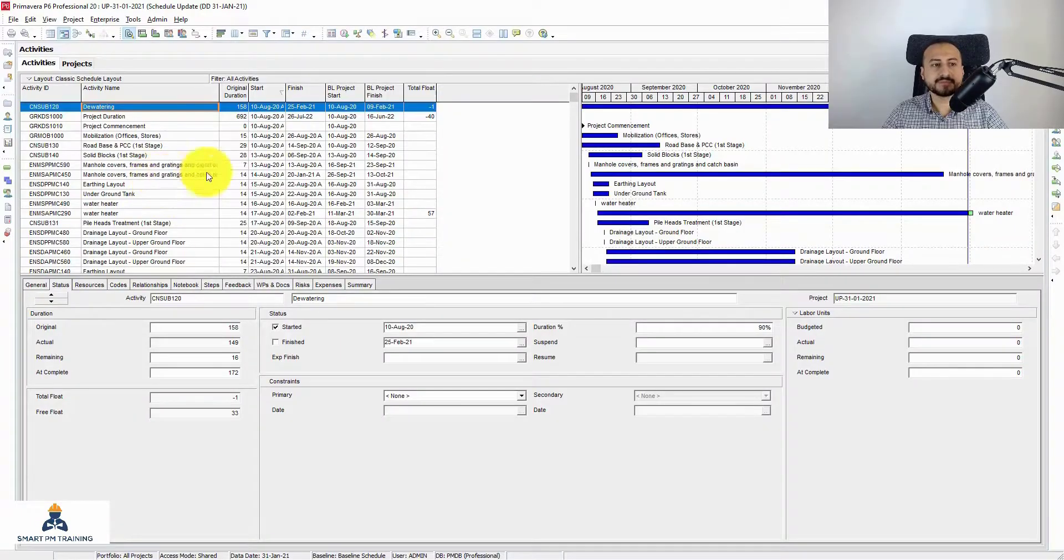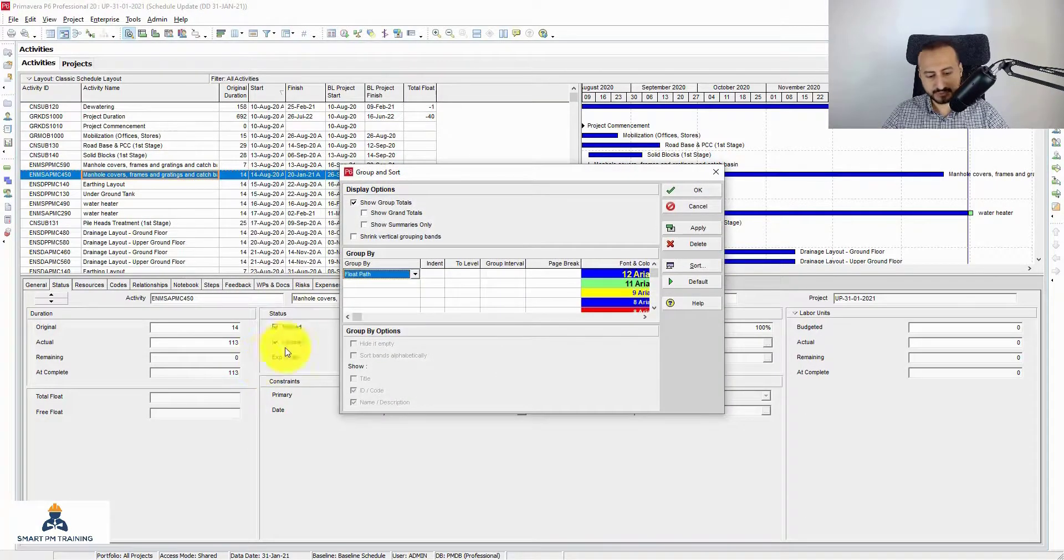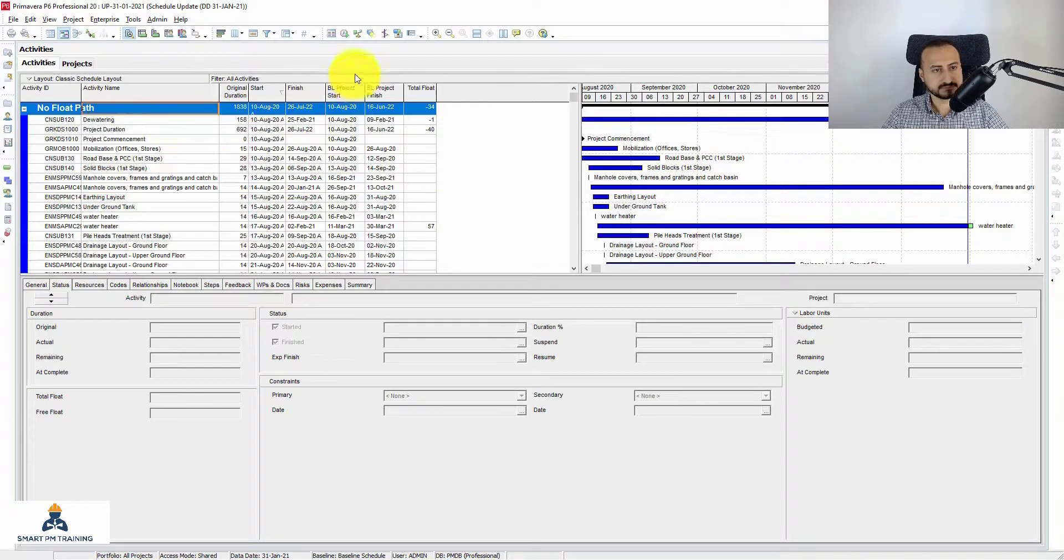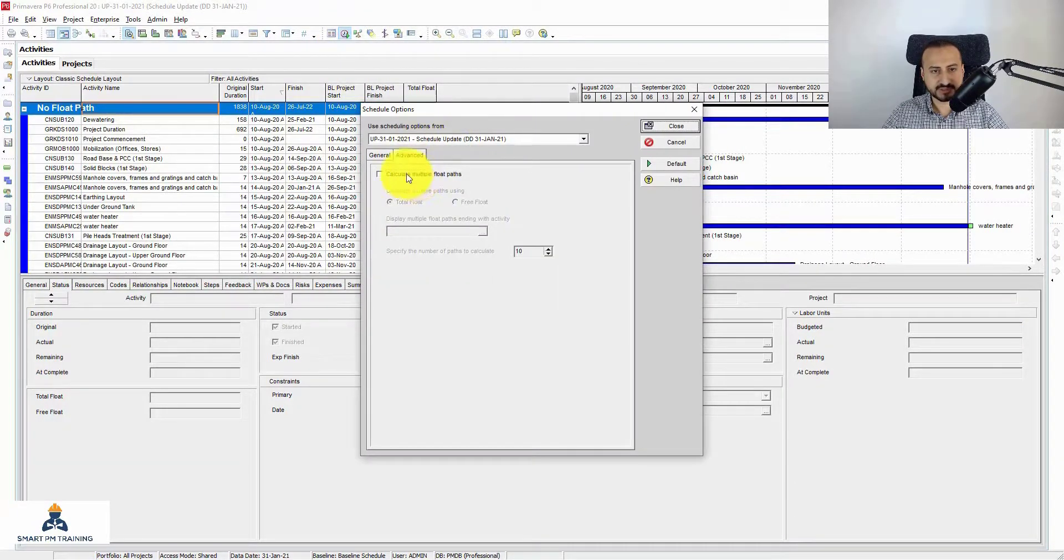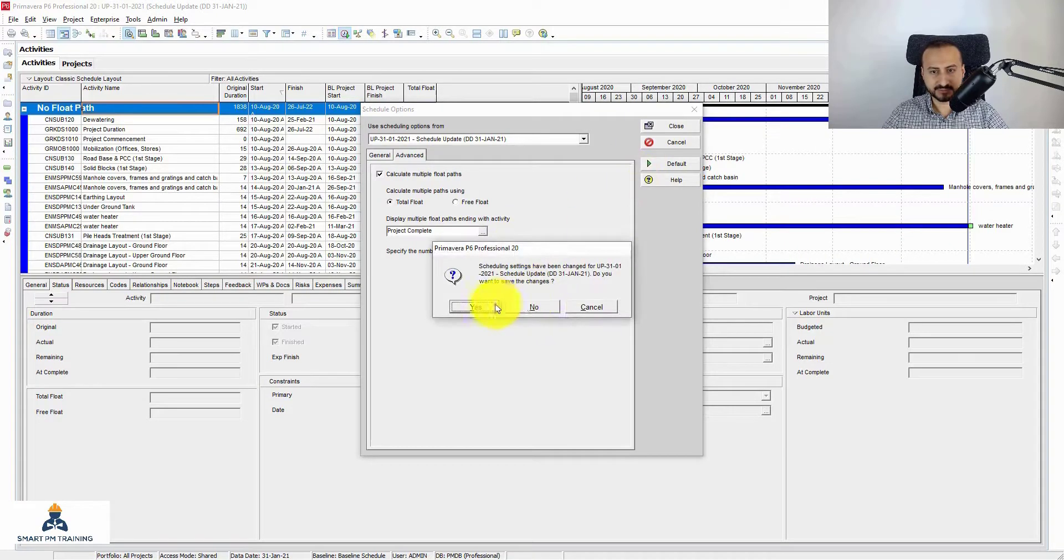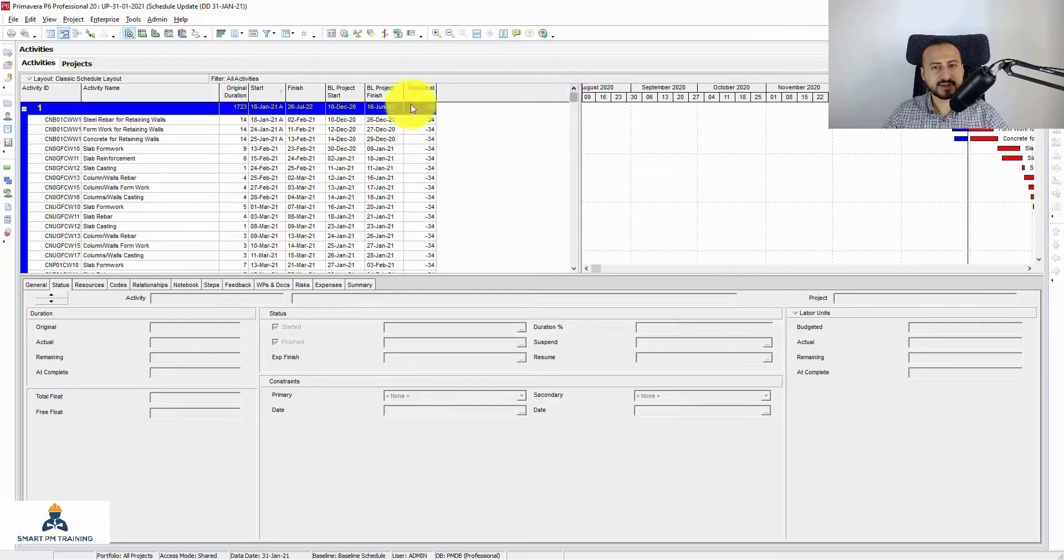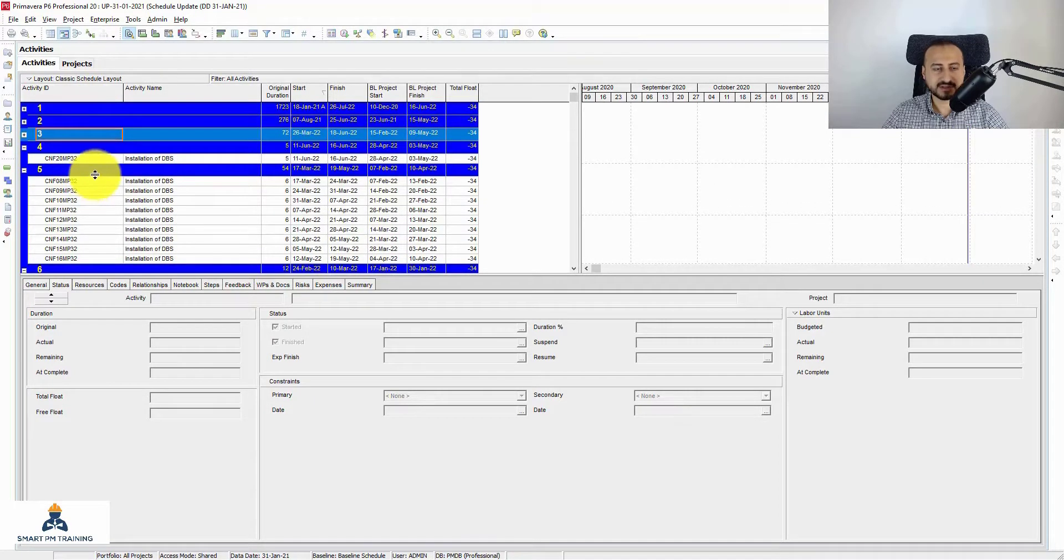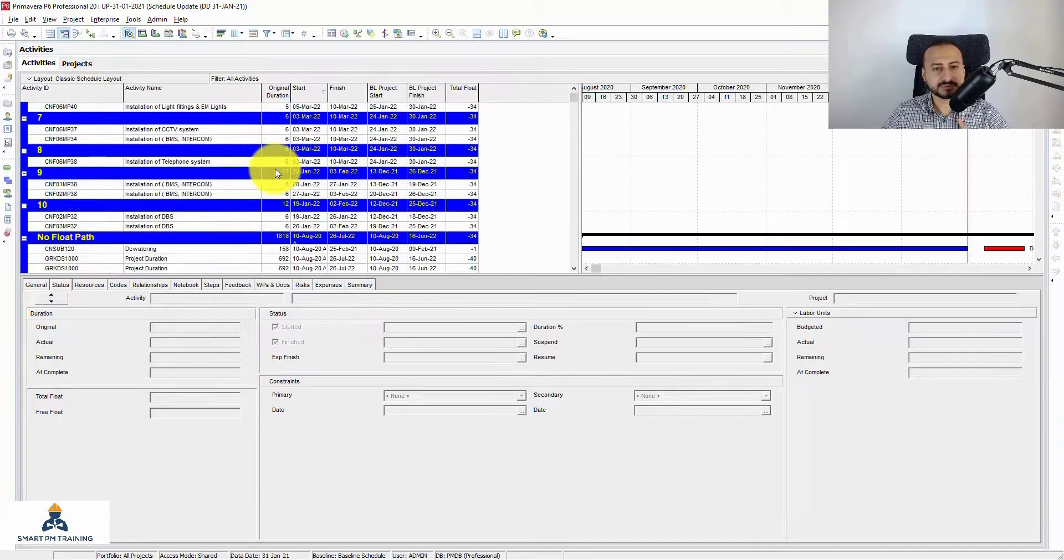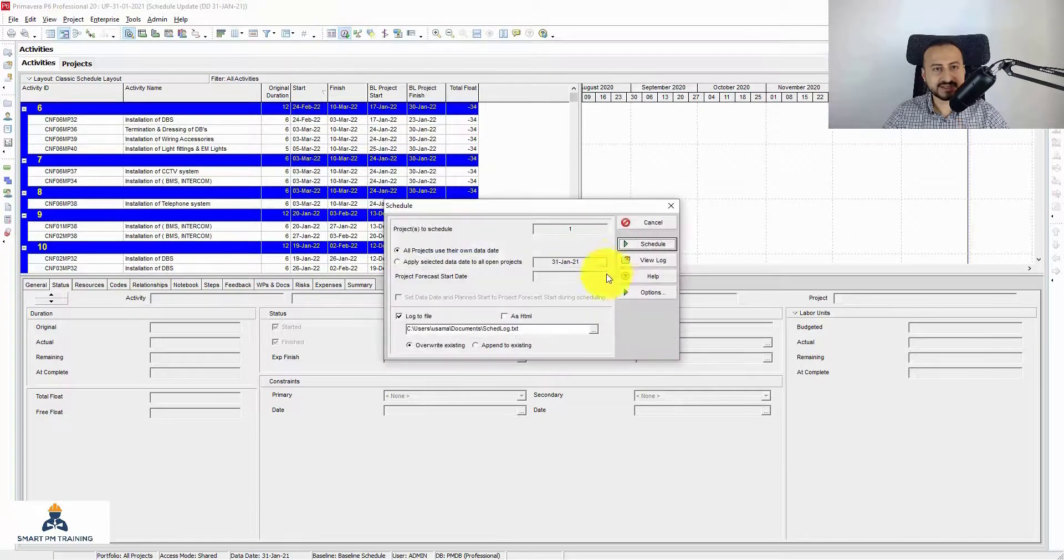So in Primavera, this is the whole activities. You can for example group by float path, but I have to run the option first. Options, advanced, project completion, say 10. Okay, no problem. And then yes, yes. Okay, so now I have, so this is by Primavera, this is one path, this is another path, this is third path. They are all critical paths, but they are grouping them by total float.